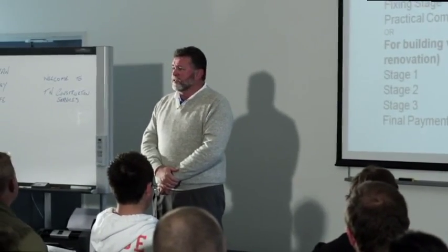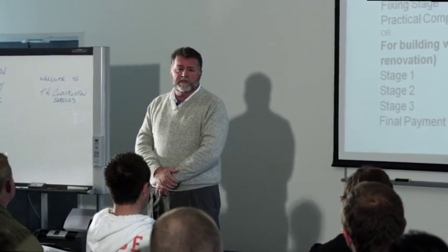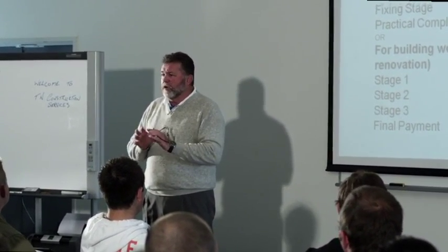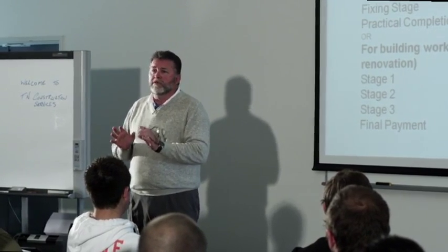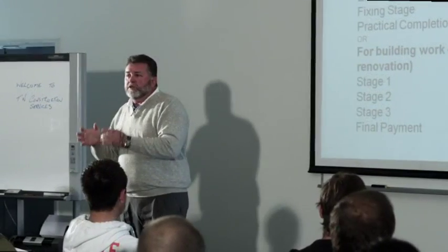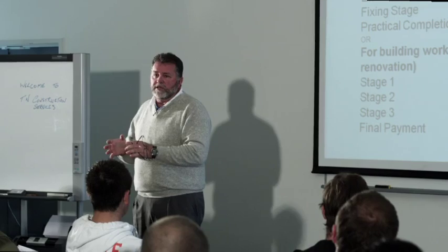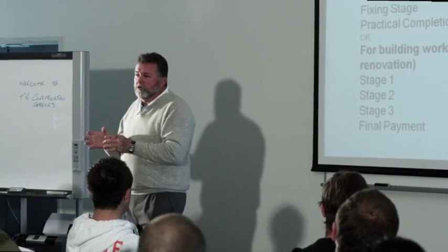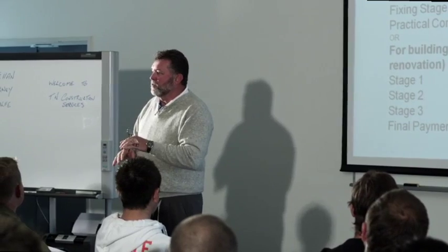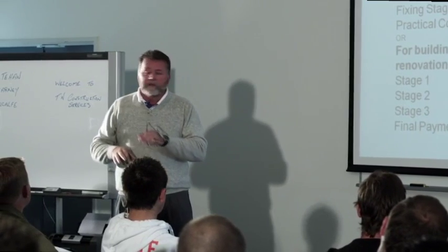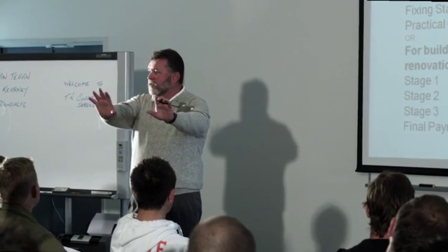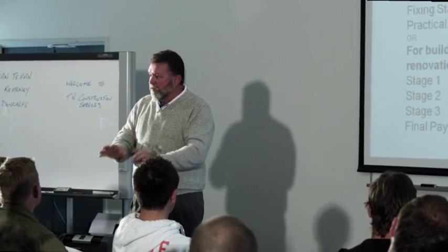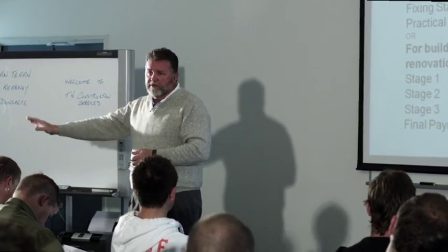Okay, in that regard, what I would do is this. If you have a look at the schedule of your works and you're going to have a massive excavation, and by massive I mean anything greater than 3 metres. Why would I pick the figure of 3 metres? Your soil conditions at 3 metres will change. In most cases, soil conditions relate to the top 2 metres of soil. So once you go over 3 metres, I would suggest that you cut the block as a contract, do your retaining walls, get the site prepared, then do your soil test, then do the house.